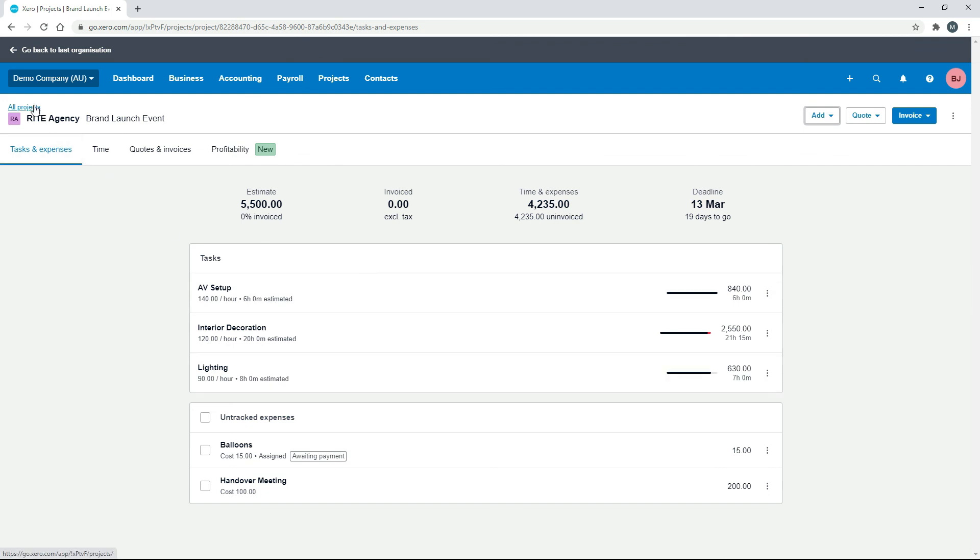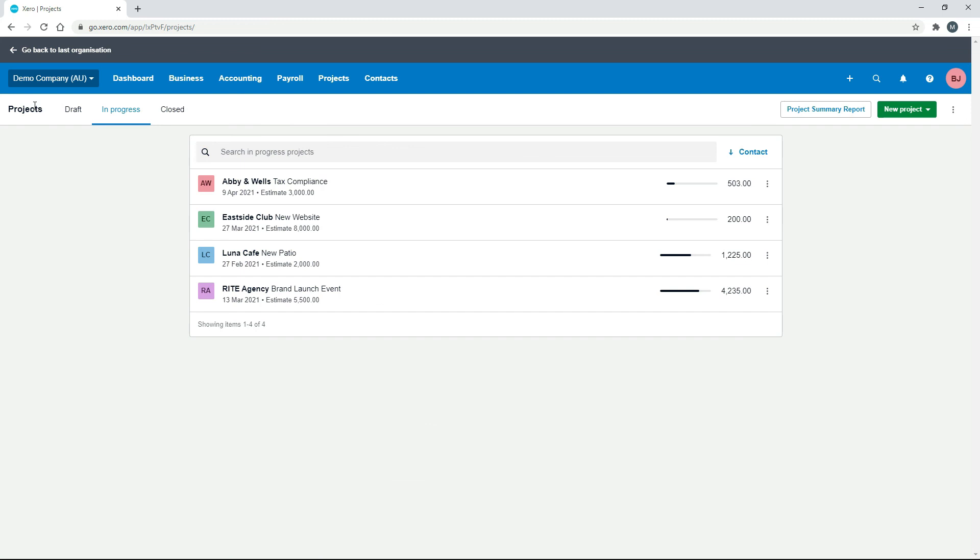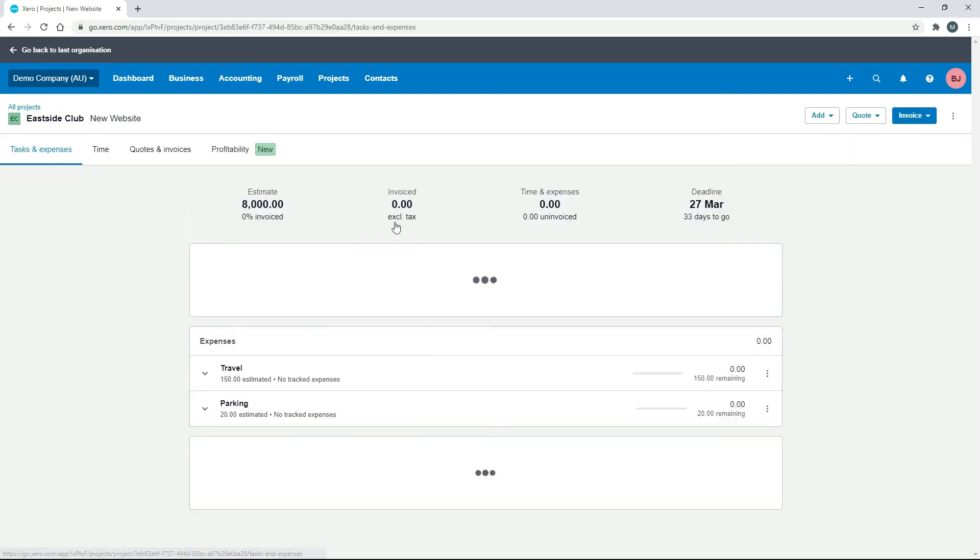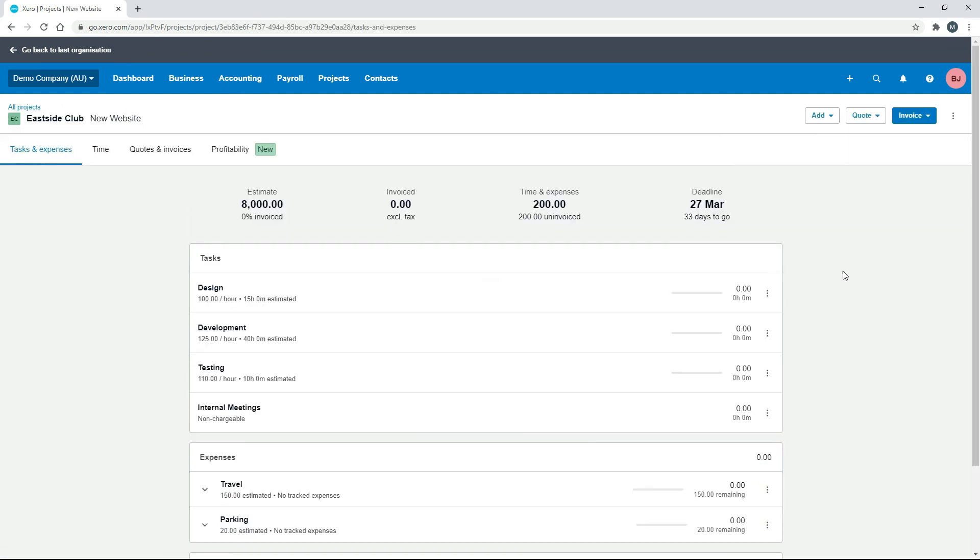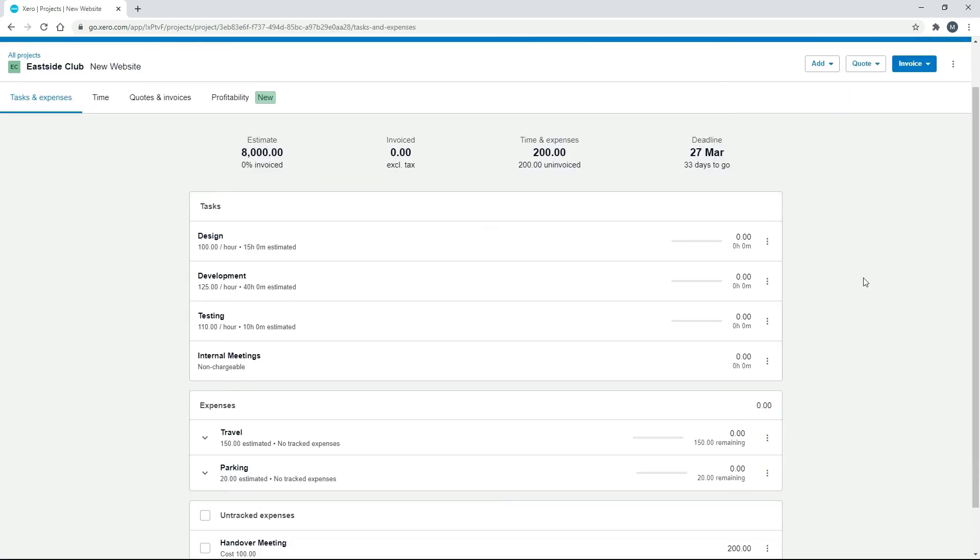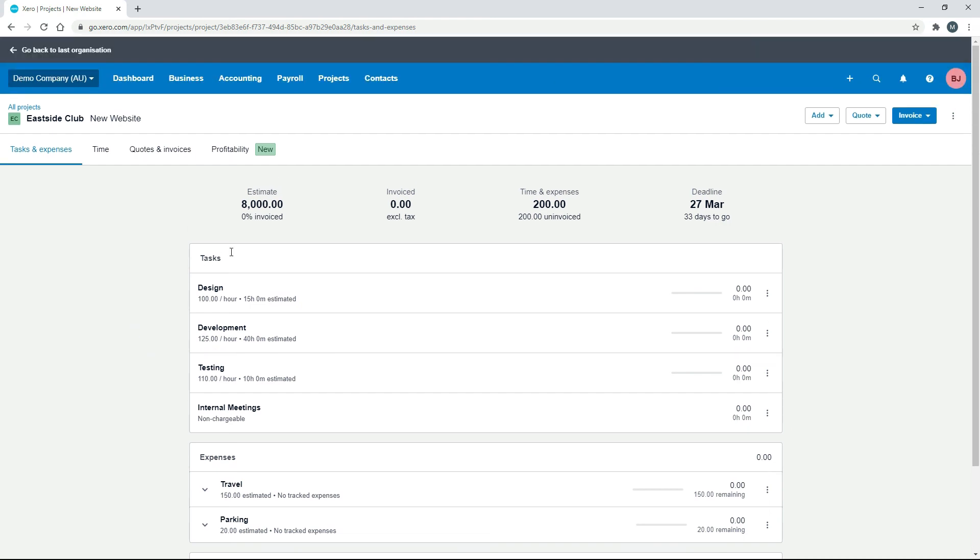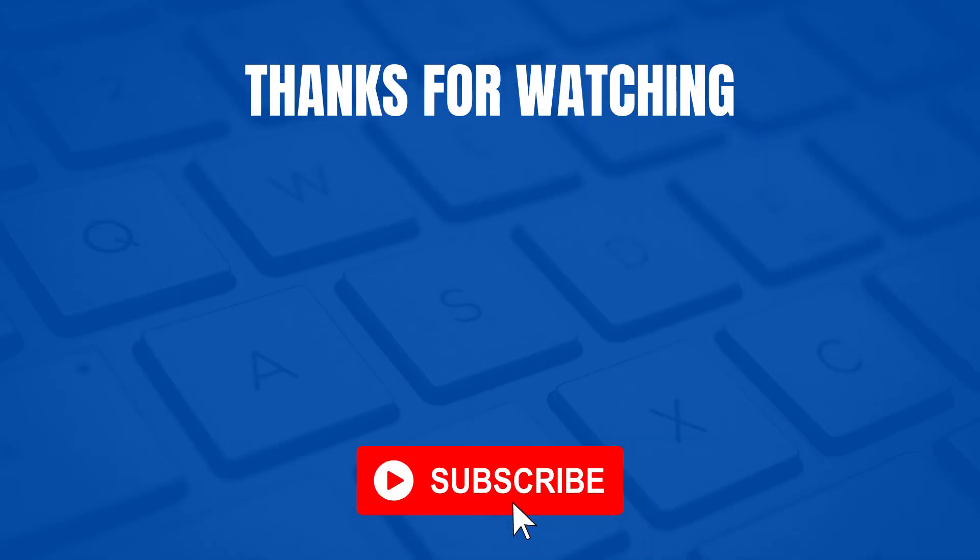So if you've got certain things that you do quite a lot, so let's say that you actually build websites all the time, you might set all of these things up as services in the products and services section, and then when you go to create your project, you can just bring them through really quickly one by one, and that should save you some time when you're setting up projects that are pretty similar to each other. Thank you.